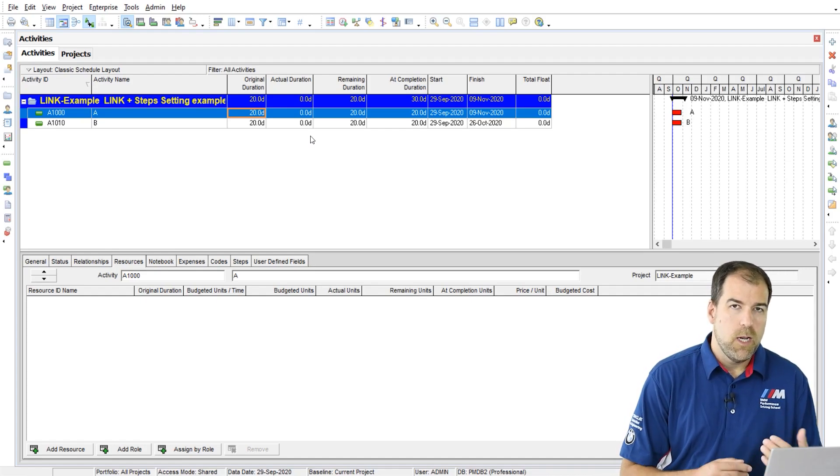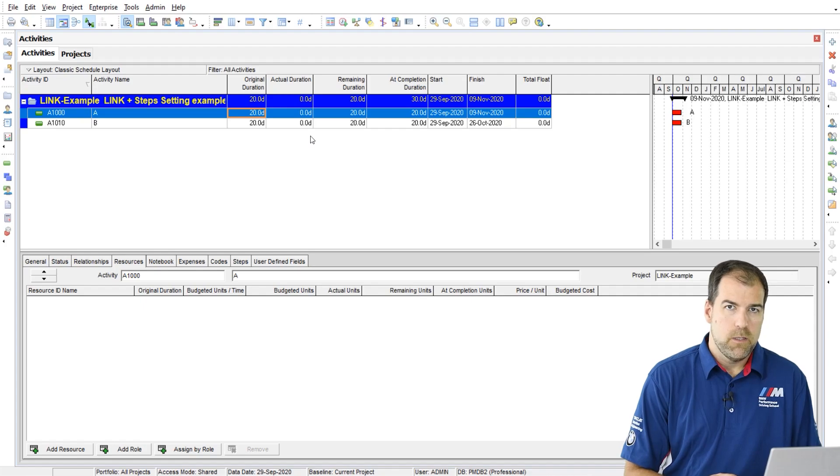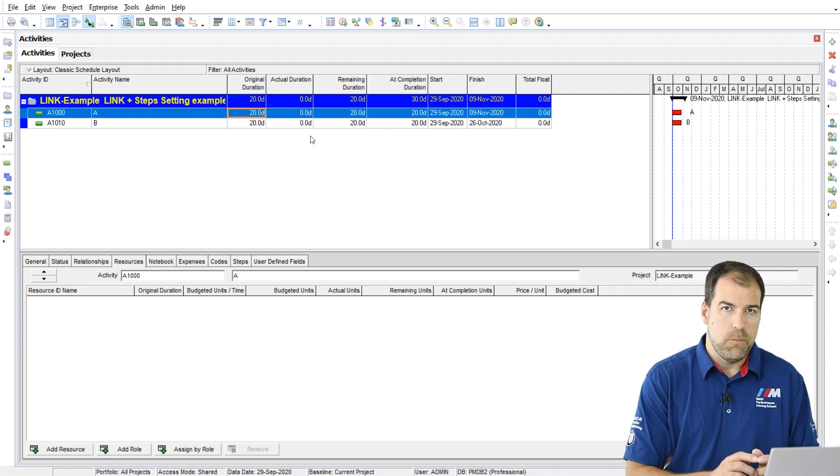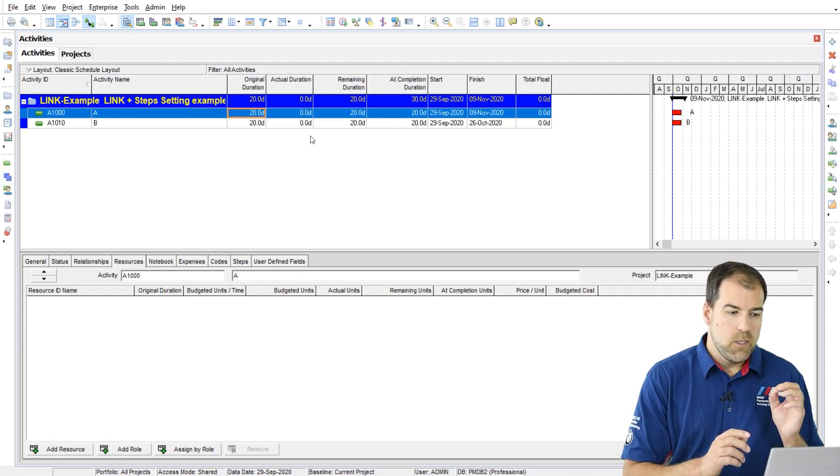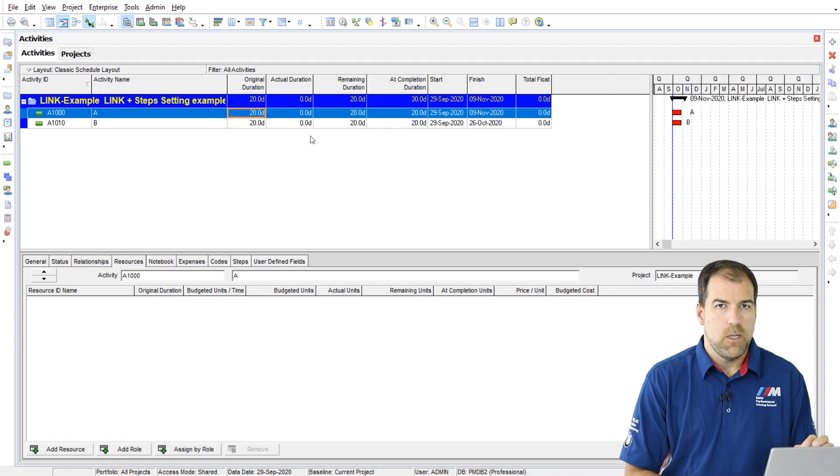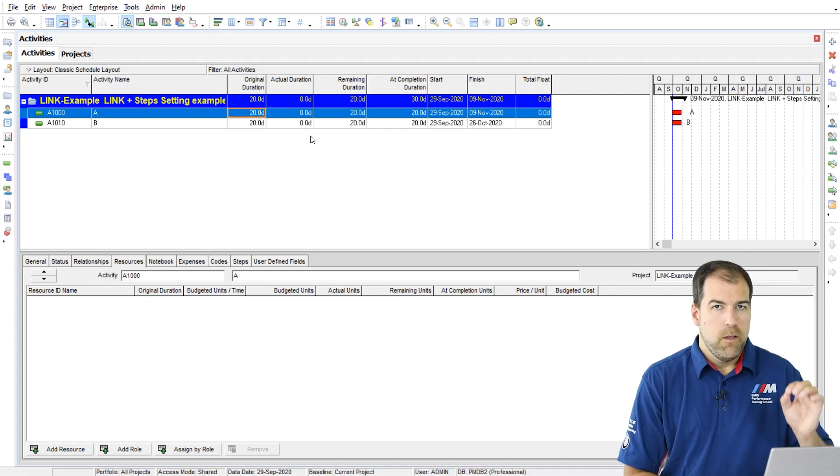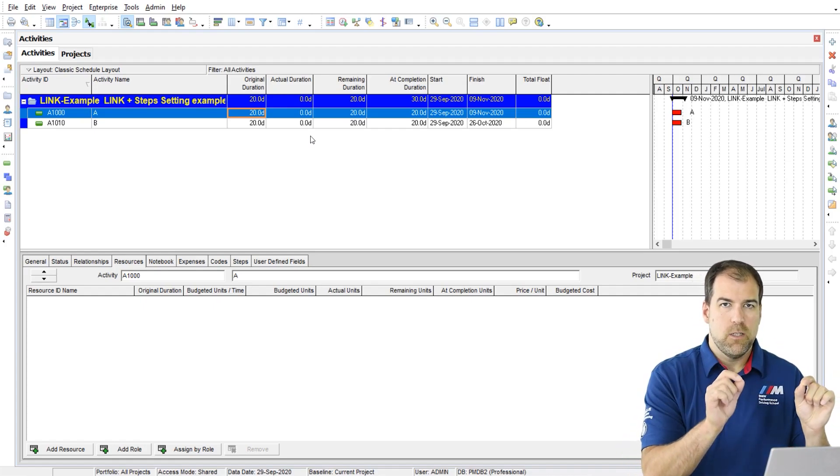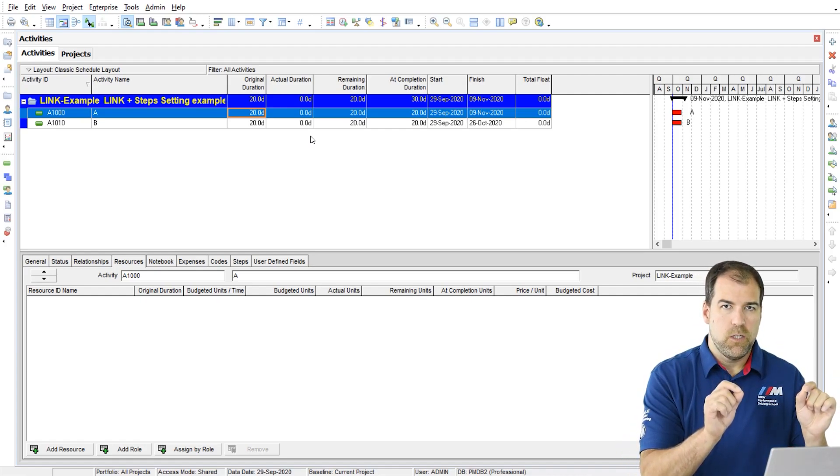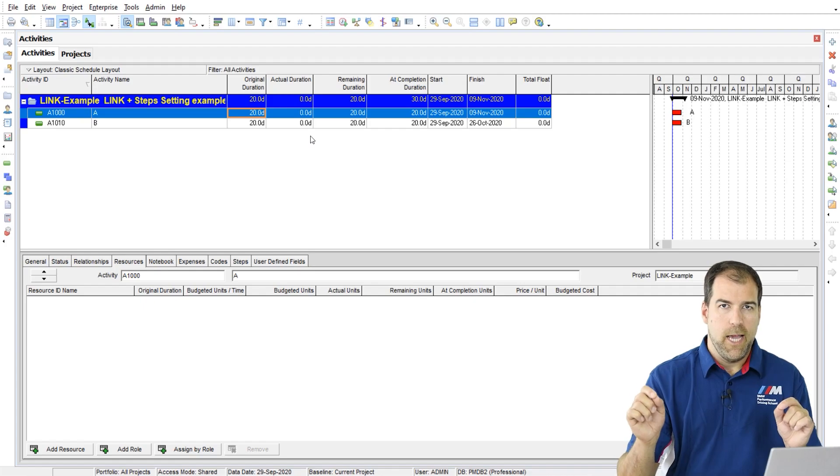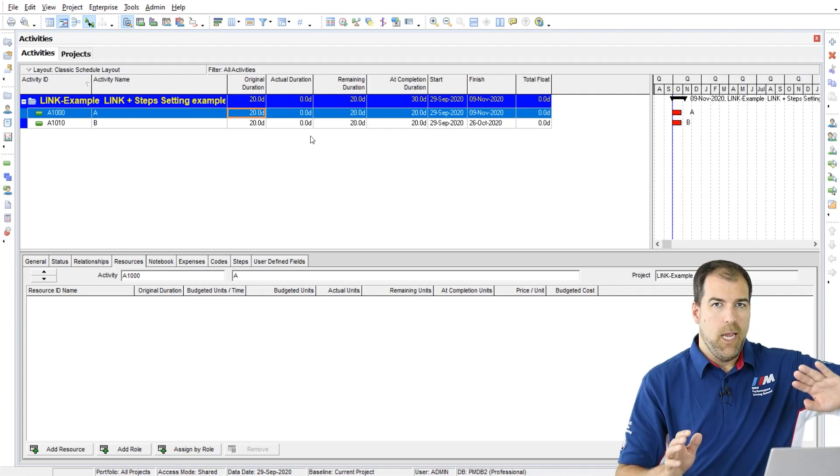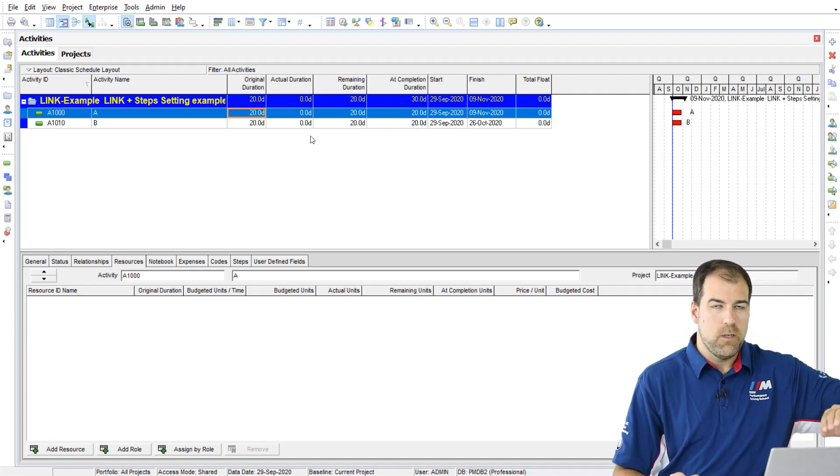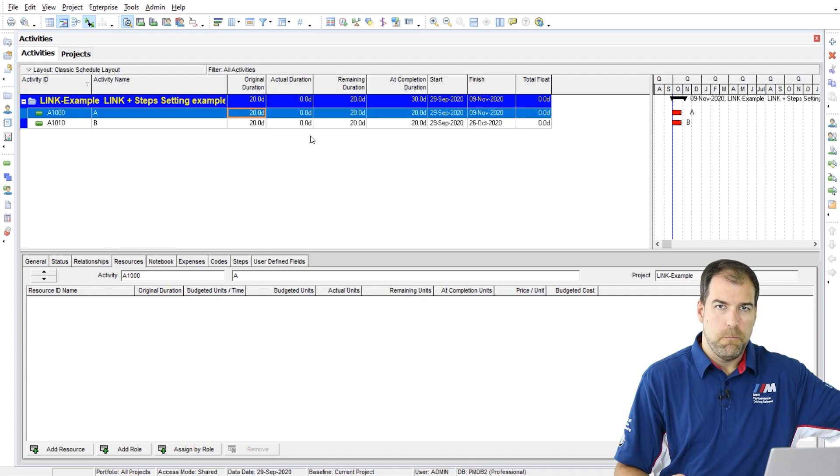I also just want to remind you that when I progress an activity, this calculation changes a little bit. When I start to progress an activity, the actual duration plus the remaining duration equal the at completion duration, and the planned or the original duration comes out of the picture.